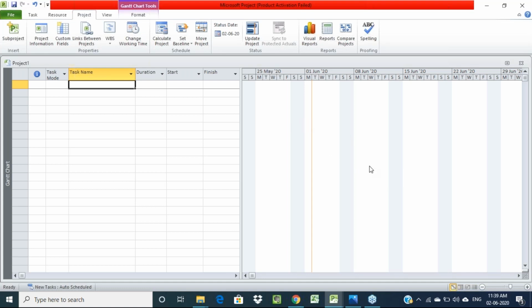Here we have to set our base calendar. Whatever calendar we have created as SVC, that calendar we have to set here, right? Here there is an already inbuilt calendar, meaning weekly 2 days holiday. That is the already existing calendar. Apart from this, we have created one more calendar. That calendar we have to set as a base calendar, so we have to select the calendar that we have created.